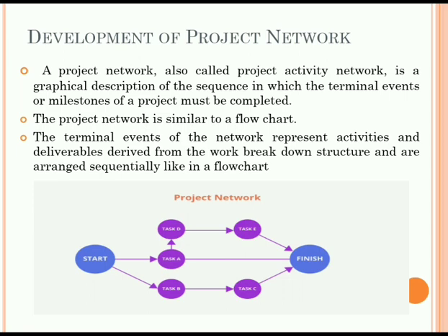But creating a network diagram requires a lot of planning. All the activities must be identified and estimated, as leaving even one task out from the network diagram can cause a cascading effect on the projected schedule commitments, resource allocations, and cost of the project also.